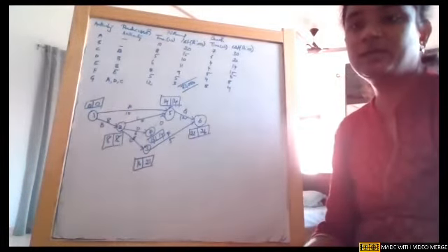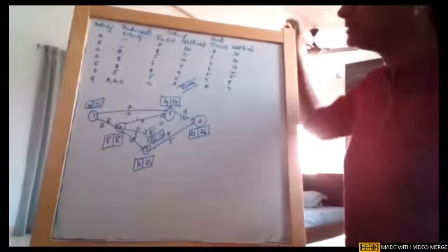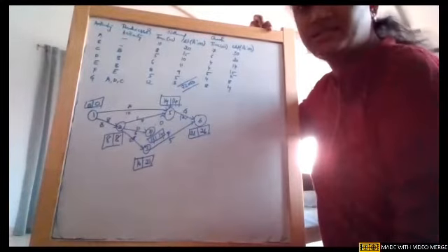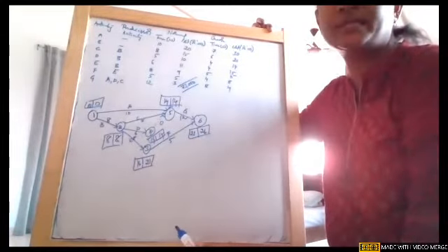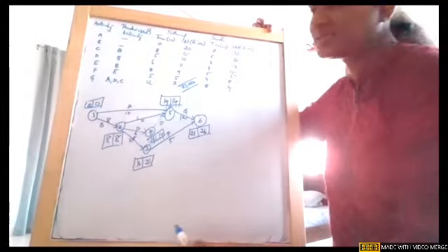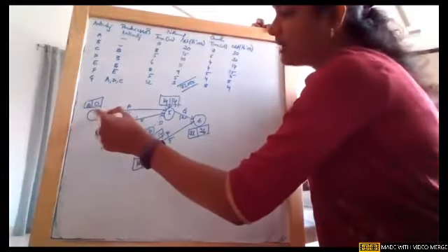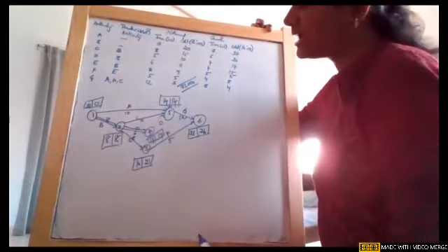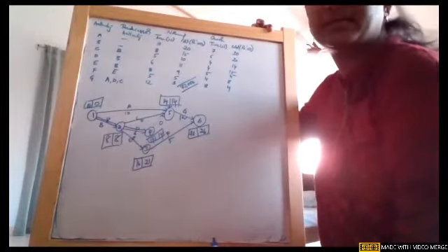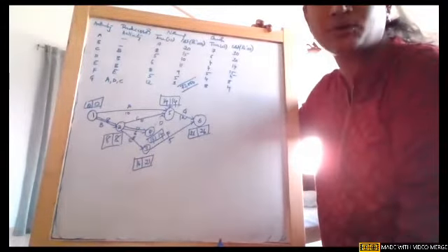When we are done with the network, see the critical path. In critical activities, we need to take the critical path which is covering the maximum nodes. So it is 1 to 2, 2 to 4. Instead of taking 2 to 5, I am taking 2 to 4 and 4 to 5, girls. If I take that way, node 4 is gone.